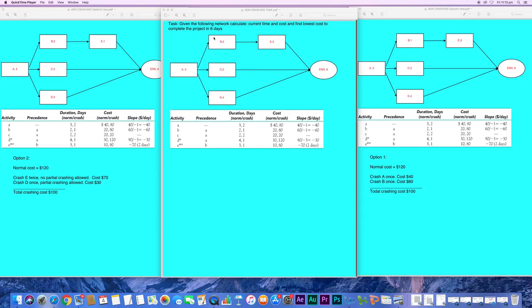And one thing I'd like to mention here is reader's task. What does it say? Is it down to 6 days, down to 5 days, whatever it's asking from you? Don't do something that's not asked from you. Learn what's the crash time. What's the crashing time? It says in your book. That's the minimum time, the shortest possible time an activity can realistically be completed in. So a little bit different than the problems behind Chapter 9, but this is proper formulation.